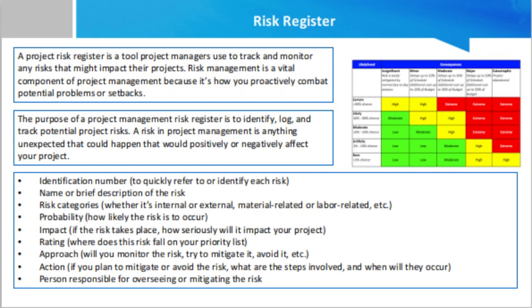Probability and impact. There are two ways to assess risk: qualitative and quantitative. Qualitative is the simplest and most common form. With this approach, you generally assess probability and impact on a 3 to 5 point scale, such as very high, high, medium, low, and very low. Quantitative risk requires assigning numerical values. Instead of saying there could be a high impact, you need to define it in quantifiable terms, such as a 2 or 4 week schedule delay or a 5% increase in cost.